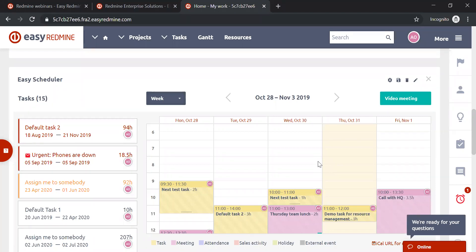In the past, when people worked with Gantt chart, they wanted to move tasks to a particular part of the day. But with Gantt, you're essentially working with just the start date and due date — a date, not a time of day. So you couldn't show someone 'work on this every morning for five days' without adding it to the task update or creating a meeting. Now we've made it as easy as drag and drop.